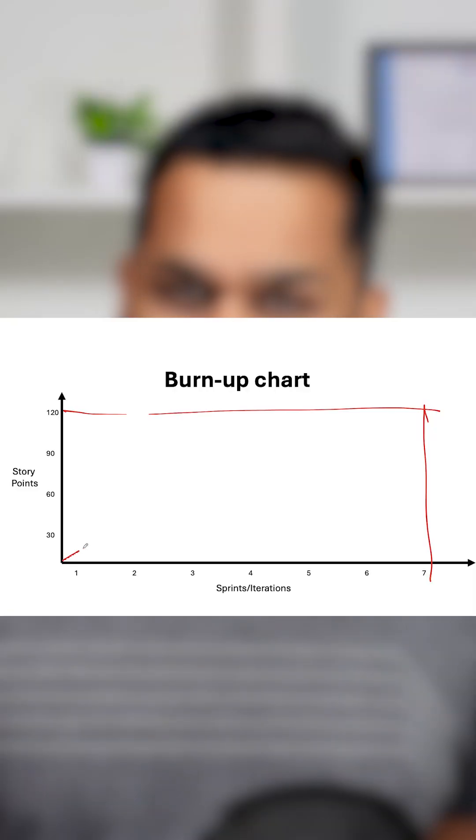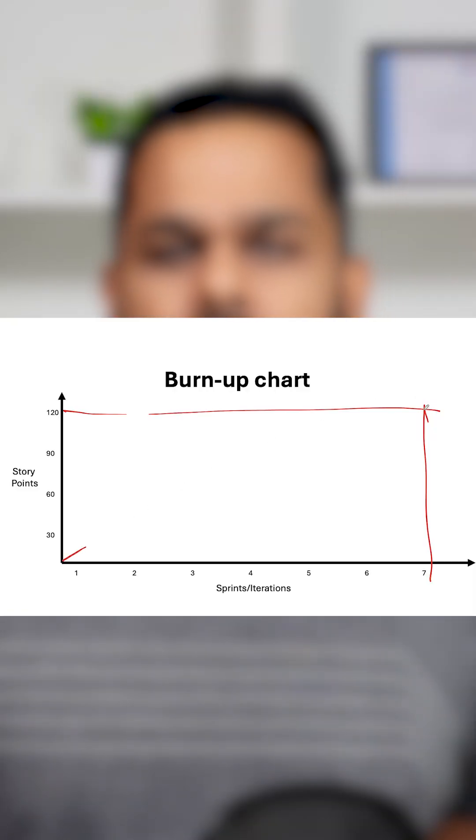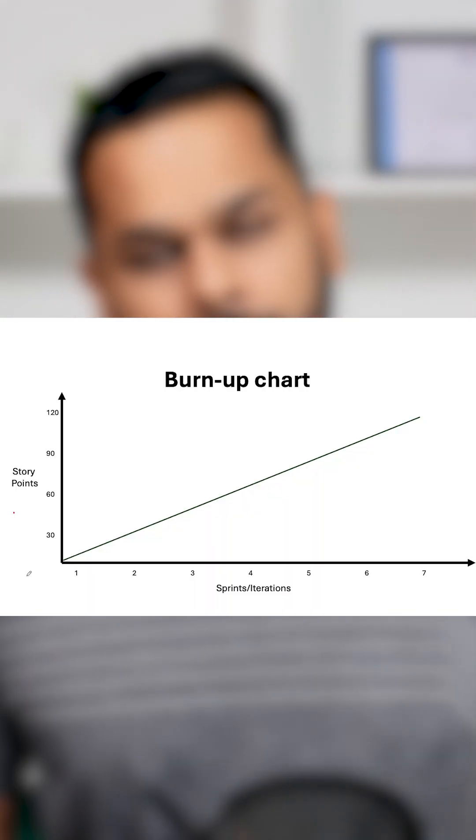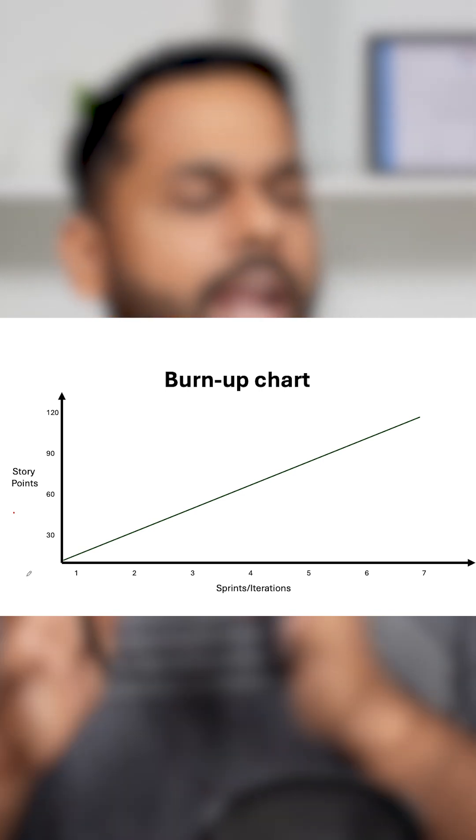Because it is a burn-up chart, we are tracking how many story points have been completed. As a plan, we would start with 0 and try to complete 120 story points by the end of the 7th sprint — so your chart would look something like this. This will be your plan.